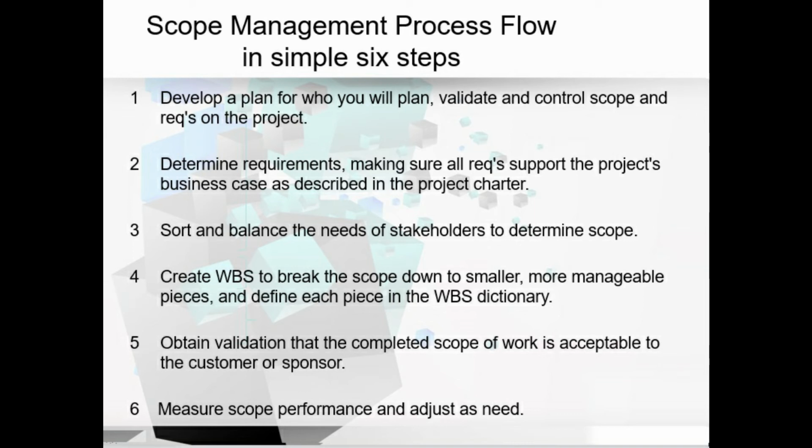In the real world, the requirements teams will be different and the scope we work on determining the requirements is different. You must be able to say no when someone tries to add unnecessary scope to your project. It adds time, cost and risk to the current project that is not at all required. You need to say it falls under a separate project and needs to go through the project approval process, and so on. This is about the scope management process flow.